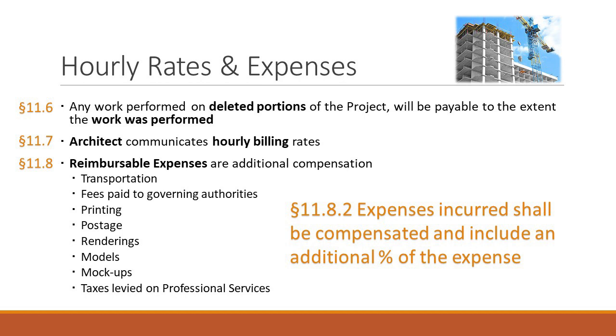And the simple economic reason for that is if I have to go out and pay someone to build models or to get a professional photographer, I have to incur those costs, I pay for them, I bill them to you because those are expenses, but I have a carrying cost. I have my time to make the phone calls to set up the appointments. I have all these other kind of hidden costs that aren't the architectural design. So those carrying costs entitle me to the 10% markup. That's kind of the thought process there.